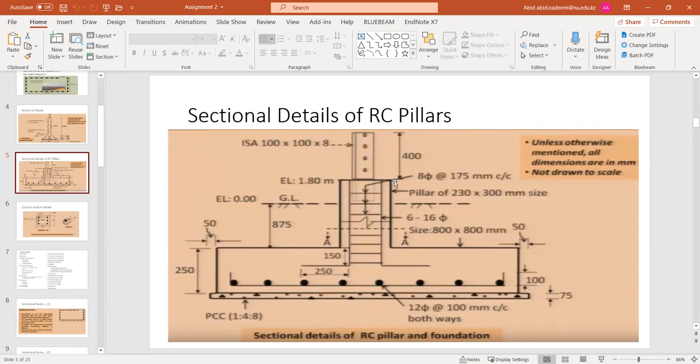Pouring the concrete. Yeah, so pouring of the concrete for both the column and the footing. So first the concrete can be placed into the footing, for example, from this open area, okay. The concrete can be placed, and then from the top of the column the concrete can be poured into the column as well. And then of course the concreting crew will have their concrete compactors as well, in the form of some probes which provide vibrations to the concrete so that the concrete is properly compacted. So in this way, work will continue.